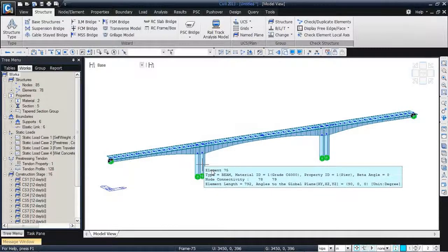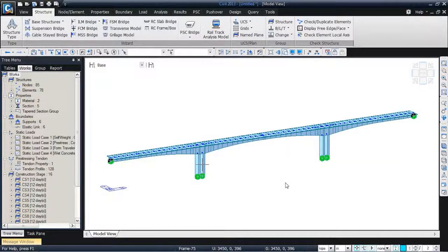Now construction methodology selection also depends upon a lot on the labor cost and the time invested and the nature of the site and the usage of the under-bridge area. So depending upon those factors, the client usually recommends or puts forward a particular type of construction methodology, and unless there is some significant saving or some other specific requirement, the construction methodology remains more or less the same.